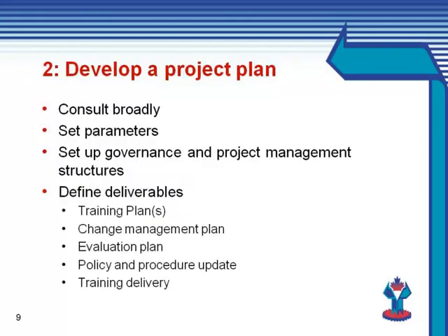Your project plan will be more detailed and more accurate than your project proposal. It will set parameters such as scope, risks, organizational constraints, project priorities, a project schedule and milestones, resource requirements, and budget. All of these components are necessary to manage the project well and monitor its progress. It is important to consult widely when developing your project plan. Decide what aspects of the project and program need consultation, who will be consulted, and to what extent, and how you will get their input.